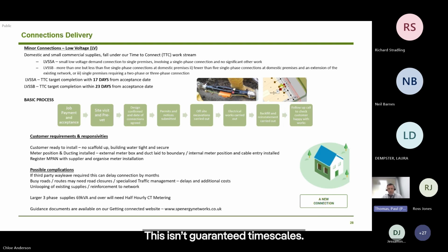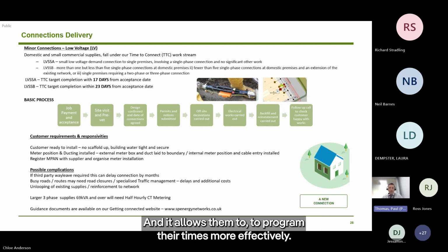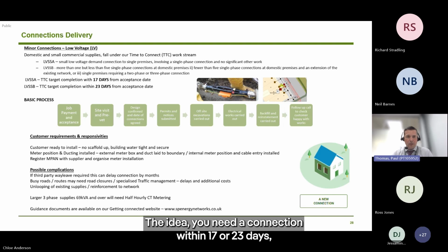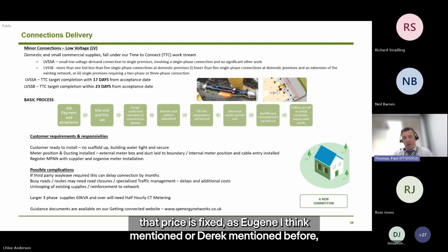This isn't guaranteed timescales, but they're designed to give the customer more of an idea of how long the project will take, rather than just 'we'll connect it when we're ready', and it allows them to program their times more effectively. On that note, if anyone's got any projects like this, please be aware: don't accept the projects until you're ready to deliver them, because if your quote's valid for 3 months, that price is fixed, as Eugene or Derek mentioned before.